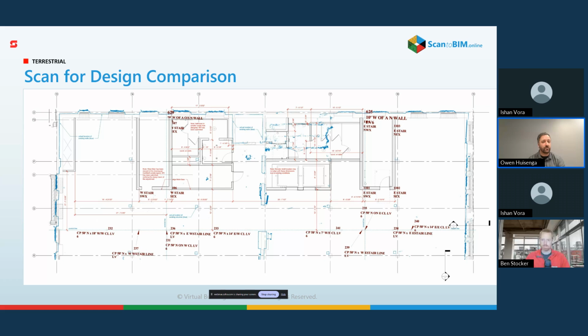You can actually look down that center wall too, running north-south. The whole building actually kind of bowed, like a banana shape a little bit, as you moved all the way across. Now, this had a real impact on some of the interior architectural elements. Columns were moved and placed directly into corridors where we had required egress clearances. And none of this would have been known, I guess, eventually would have been known. But we were able to identify this early on and actually address some of the architectural design itself to take into account some of these existing conditions.